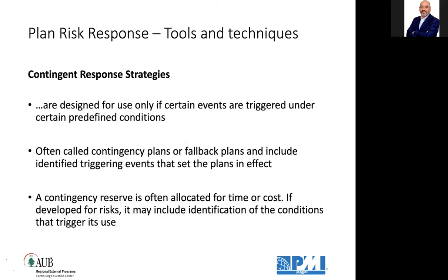Contingency response strategies. These are designed for use only if certain events are triggered. So the triggering criteria should be well specified in the response plan. It is often called contingency plans or fallback plans and include the triggering events. A contingency reserve is often allocated for time or cost.